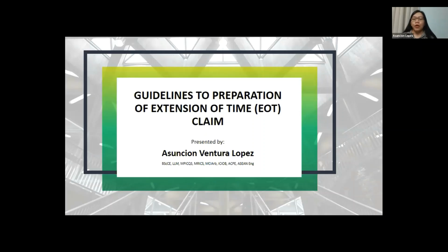In order for the contractor to be successful in the submission of an extension of time claim, he must first establish the causation, then demonstrate the time-related disruptions that were experienced as a result of the delay event. Now, this process of recording the delays requires continuous involvement of the planning team, all of you. Most of you are planning engineers here, with the support from all other departments of the project.